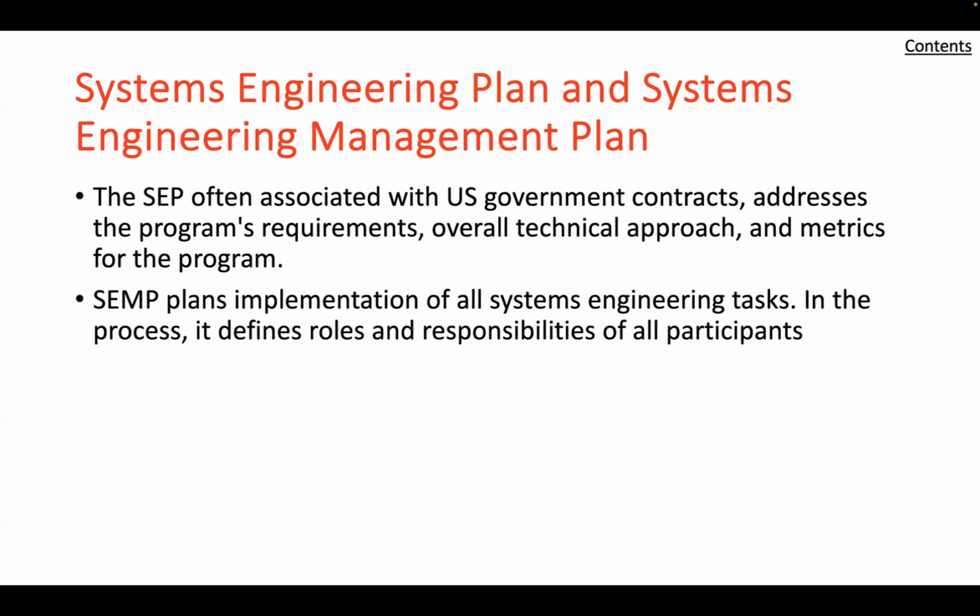Programs shall develop a systems engineering plan, a SEP, for Milestone Decision Authority, MDA, approval in conjunction with each milestone review and integrated with the acquisition strategy. This plan shall describe the program's overall technical approach, including processes, resources, metrics, and applicable performance incentives. It shall also detail the timing, conduct, and success criteria of the technical reviews. End of quote.